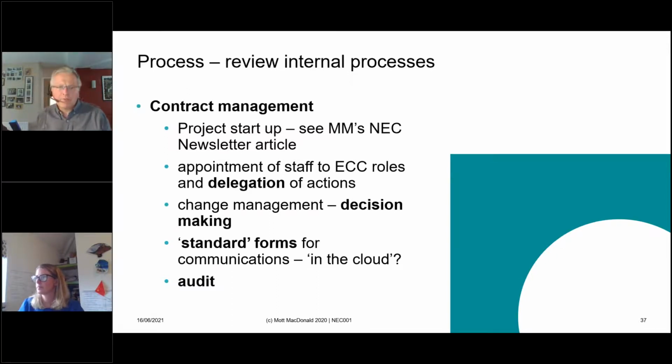You've then got to make sure there is a delegation clause. So in Mott MacDonald, for example, we require anybody appointed to be the project manager or the supervisor. I haven't actually mentioned the project manager in this presentation. That's really crazy, isn't it? Because we've got a whole lot of project managers out there. The name of the entity, the person that does the day-to-day management on the client side is, wait for it, the project manager. Not the engineer, not the contract administrator, but the project manager. Because NEC recognizes that this is a project that we're managing.